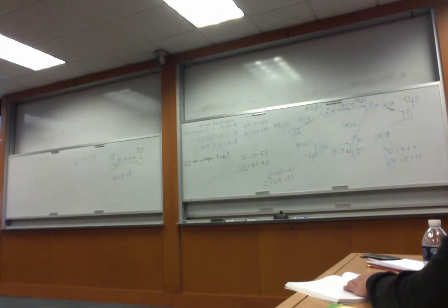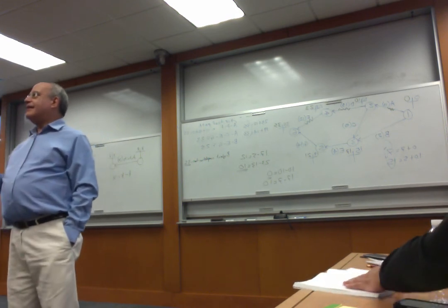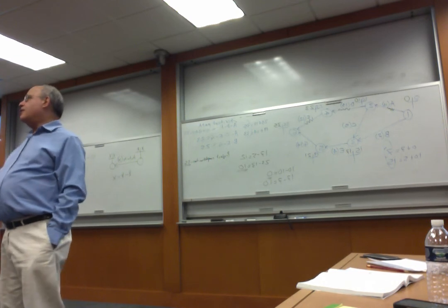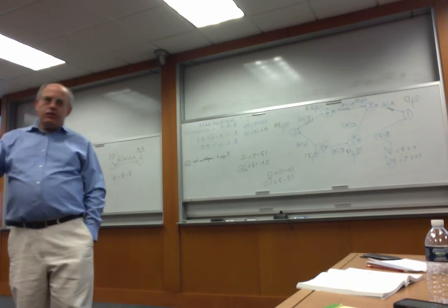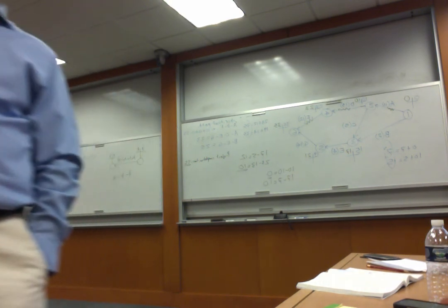How do you slow down an activity? By freeing up workers working on it. So you free up workers and you reallocate them somewhere else. This is very useful, especially in construction management. Those construction workers are multi-talented. They are not necessarily doing one type of work; they can do more than one type of work. So if you know these things, you move them around. You say, instead of working on this one, just go and work on that one.